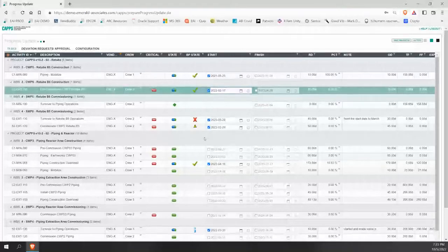Okay, so let's actually do some updates and then you'll get an idea of how you could use it with your team. So we usually update start and finish dates. That's pretty common. And then how you update the rest might vary. Okay, so some people might be using resources, expenses, etc. We're going to skip that for the first example. We're going to just make it simple and do the start, the finish dates, and the remaining duration.